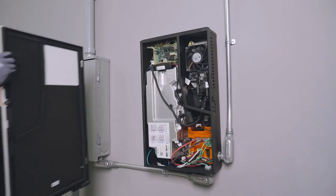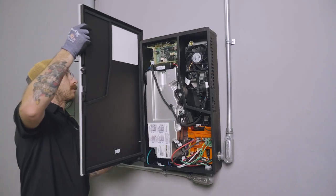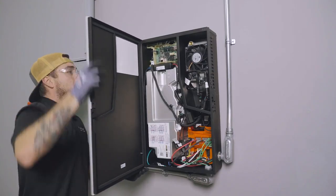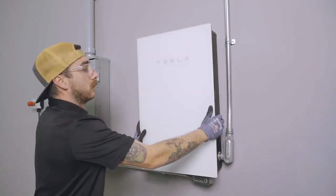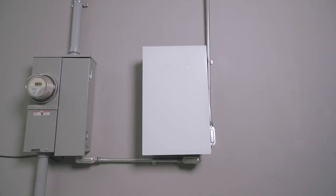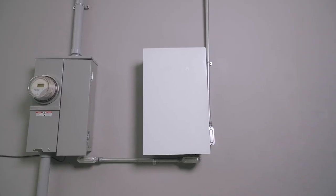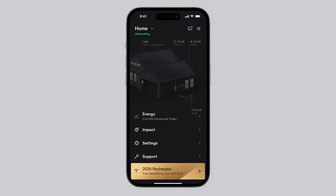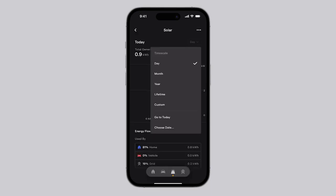With the inverter commissioned, ensure that the inverter door is latched and that the captive screw has been tightened to secure it closed. Ask the customer to open their Tesla app and verify that they have visibility of their system. Customers who already have a Tesla vehicle will swipe on the home screen to view their solar inverter system.